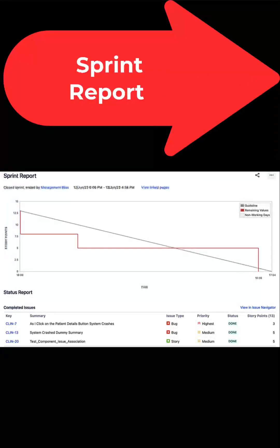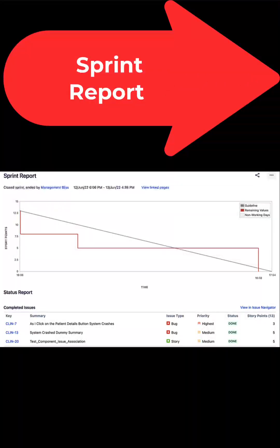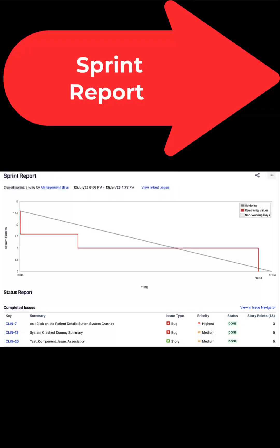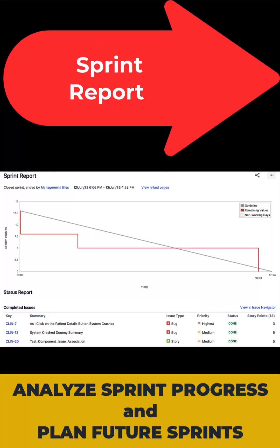Sprint report provides a comprehensive summary of a sprint, highlights completed and remaining issues. Use this report to assess the team within the sprint duration and to plan effectively for future sprints.